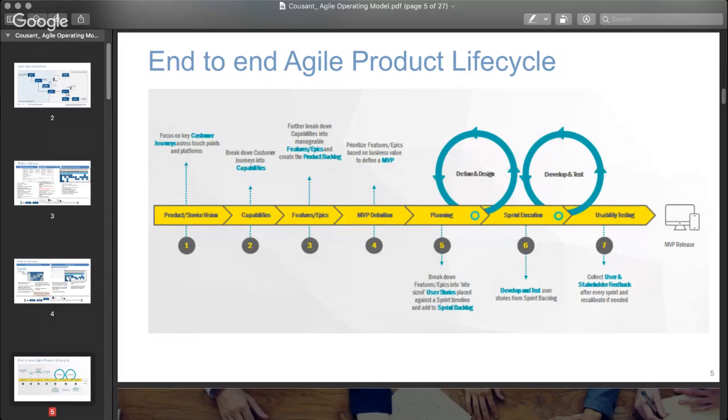It's just, think about your functional and non-functional requirements for your high-level program. What are the requirements that you need? All of that needs to be put into some kind of a backlog, right? And then the next thing you would do is you would prioritize that based on business value, and you use that to create an MVP. And then from there, you plan.